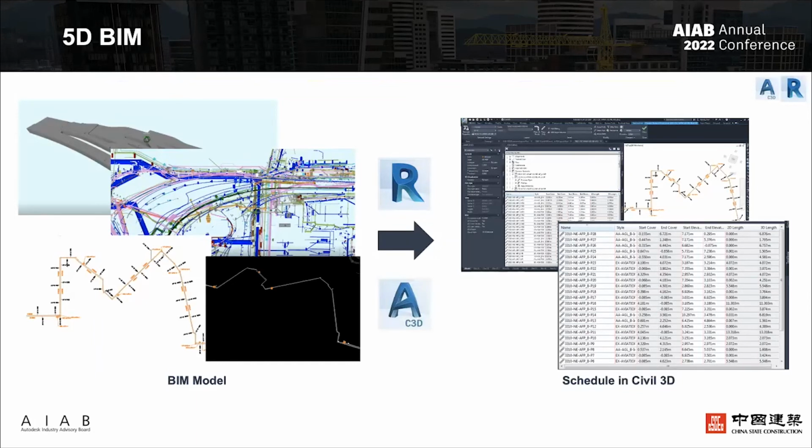5D cost estimation is another key application in 3801, especially in our BIM and NEC collaboration workflow. During the 5D BIM process, it is all about whom we are sharing the model with, for what purpose, and how to connect BIM data and BQ with a high level of freedom. So the modeling practice and guideline are well discussed with our quantity survey team before modeling, in order to make sure the BIM elements are matched with the BQ items, like the underground utility and the tunnel structure.